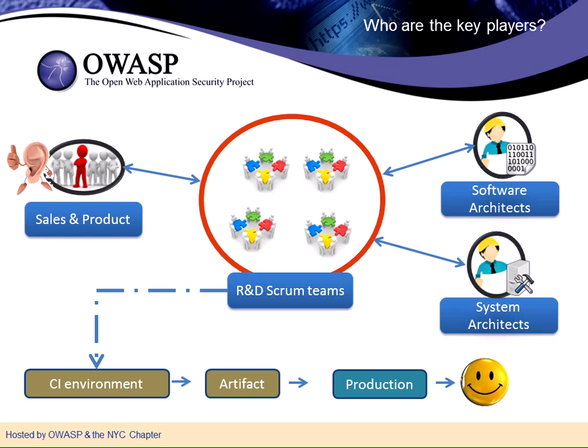LivePerson today includes 22 scrum teams and about 200 developers in R&D. Each scrum team includes members such as scrum master, product owner, QA, and developers. When you look at this flow, you understand that Agile is about an adaptive approach, but it's not chaos — you work in an environment that's a stable framework allowing the different scrums to add to this infrastructure.